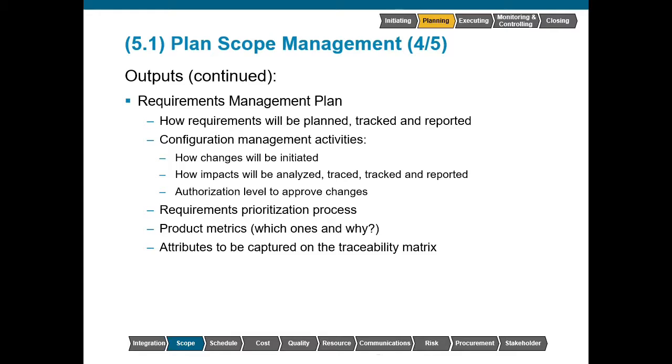So configuration management activities, and this is very important. We had spoken previously about the configuration management plan and how it relates to the change management plan. We want to look at how changes will be initiated and the impacts that these changes will have, because all changes will have second and third order effects. It's going to have unintended consequences, and not just necessarily to the schedule or budget. It could also be to interoperability of other components of the deliverable. So maybe upgrading one piece of software will make another piece shut down, or maybe changing the operating system means that legacy software will no longer operate the way that we want it to.